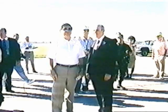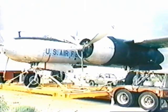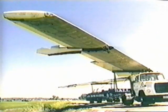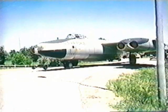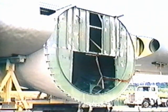As the summer of 1997 rapidly approached, everyone focused on the first major aircraft move. Years of dreaming and months of planning culminated in a 14-hour move of 16 major loads. With a crew of over 100, the first procession snaked its way across back Nebraska roads to the new site. The move included the SR-71, D-25, RB-45, A-26, and the B-47. The tail sections of the B-36 and B-52 were also moved. Needless to say, the largest aircraft move in history drew just a little attention.